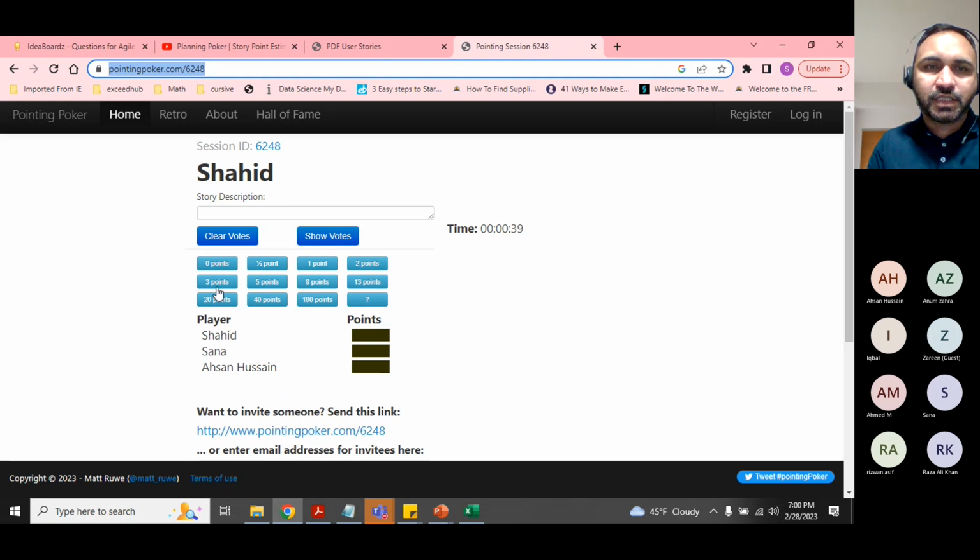Okay, good. So you see this option, right? 0, half point, we don't use them. We use the Fibonacci sequence. Remember 1, 2, 3, 5, and 8, 13 the max, right? So remember, this is where you do anonymous voting. For example, what if one team member keeps calling, oh, it's 13? Then all the team members will start agreeing with that. That's how you facilitate the estimation piece, by running anonymous voting.